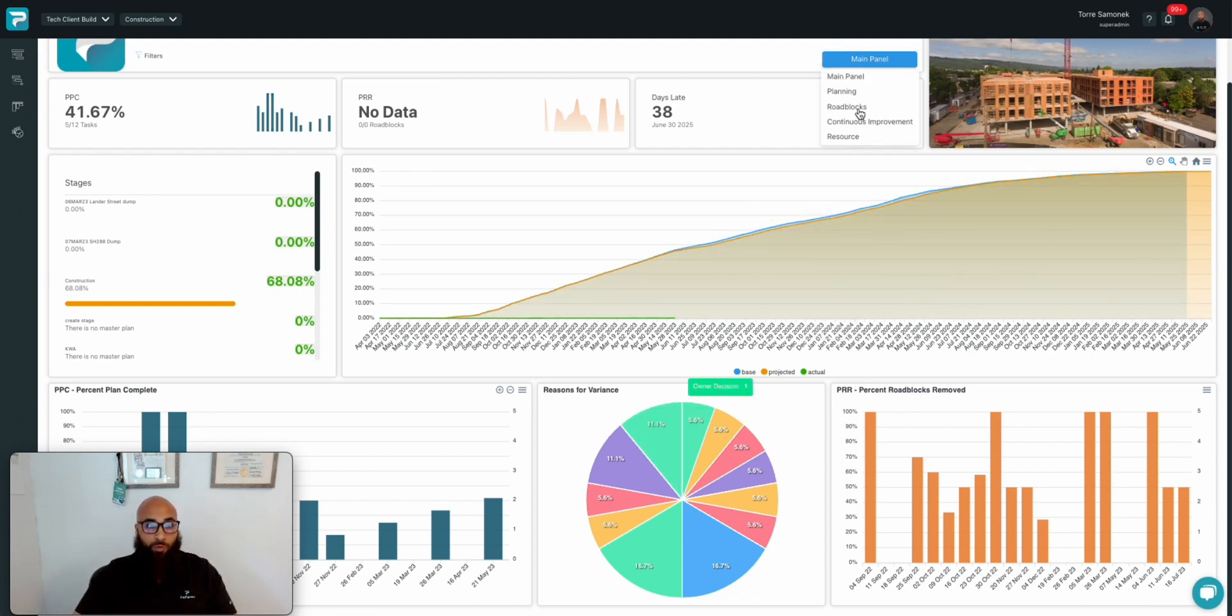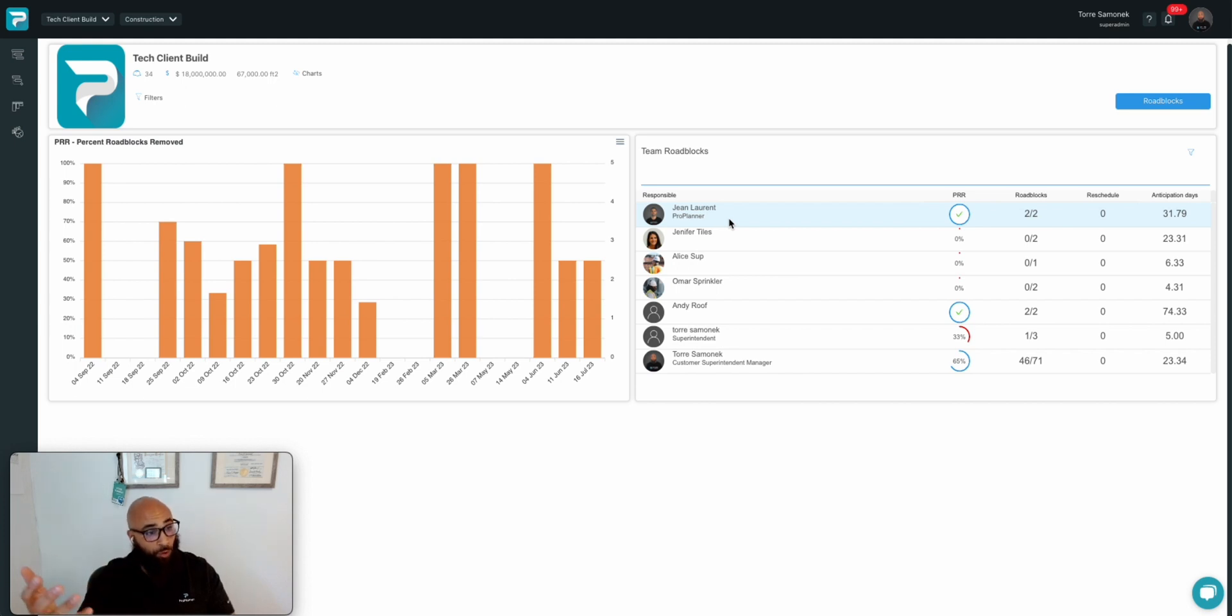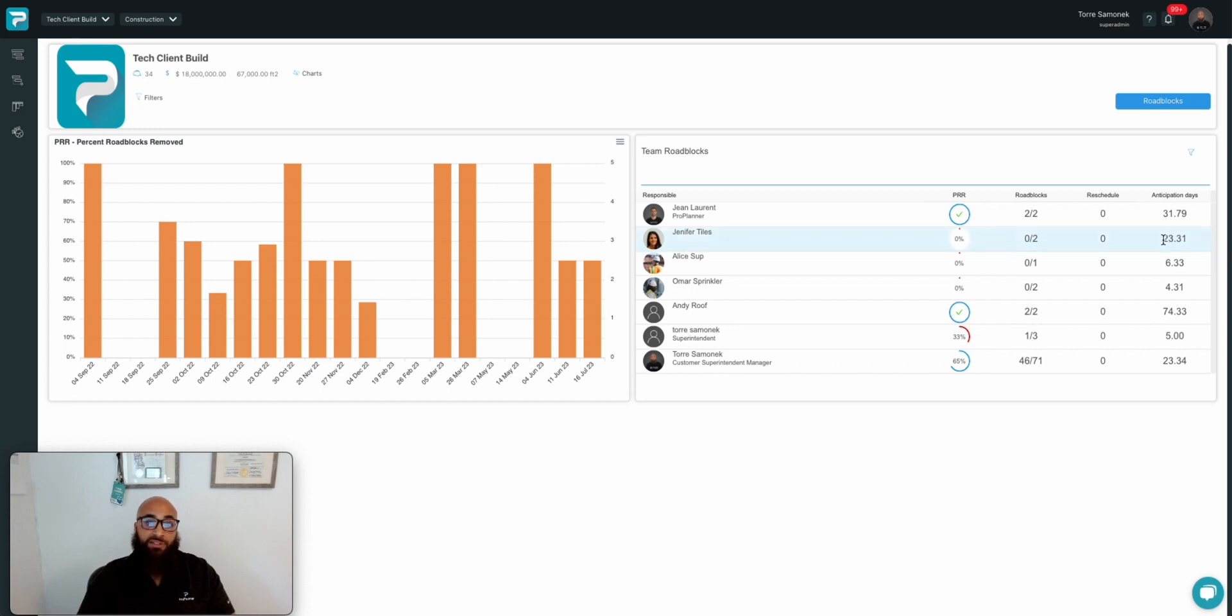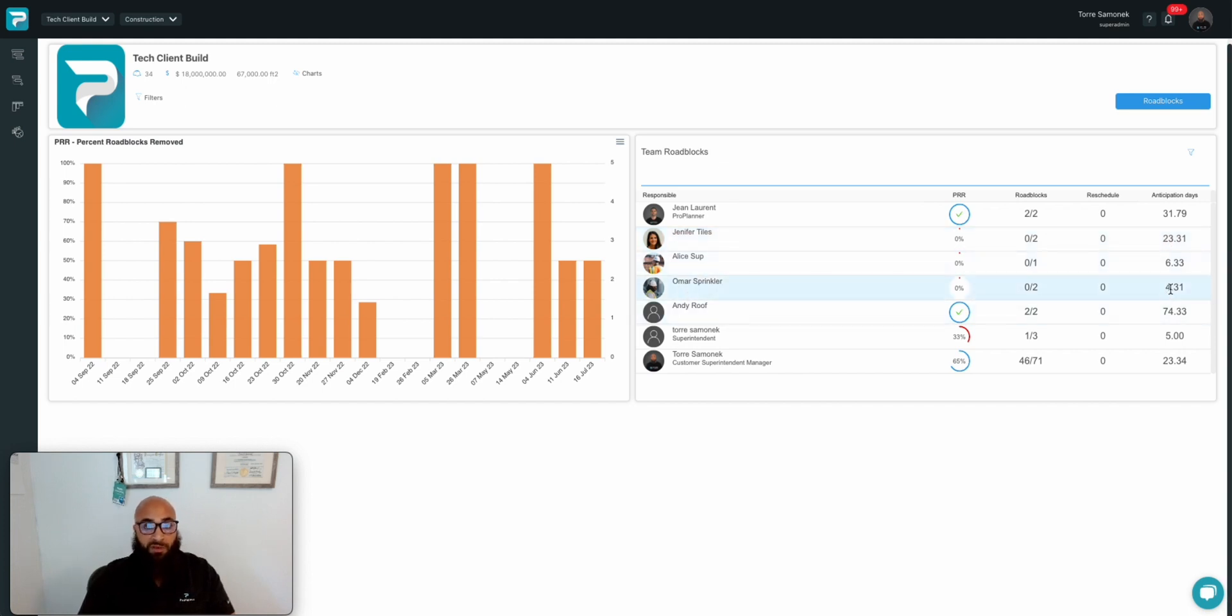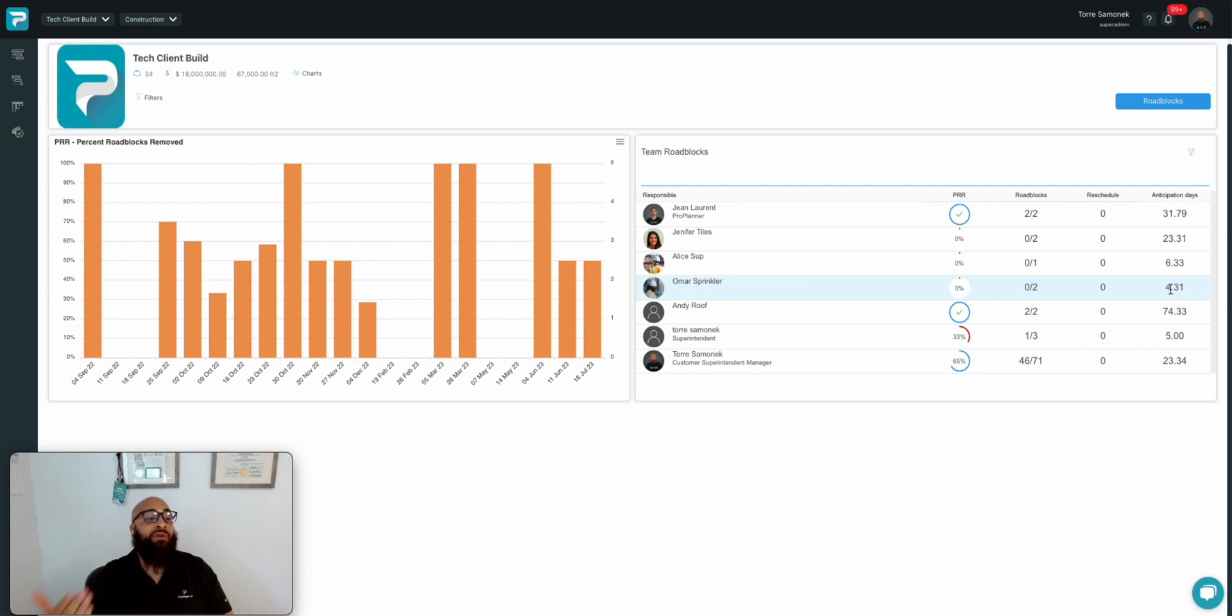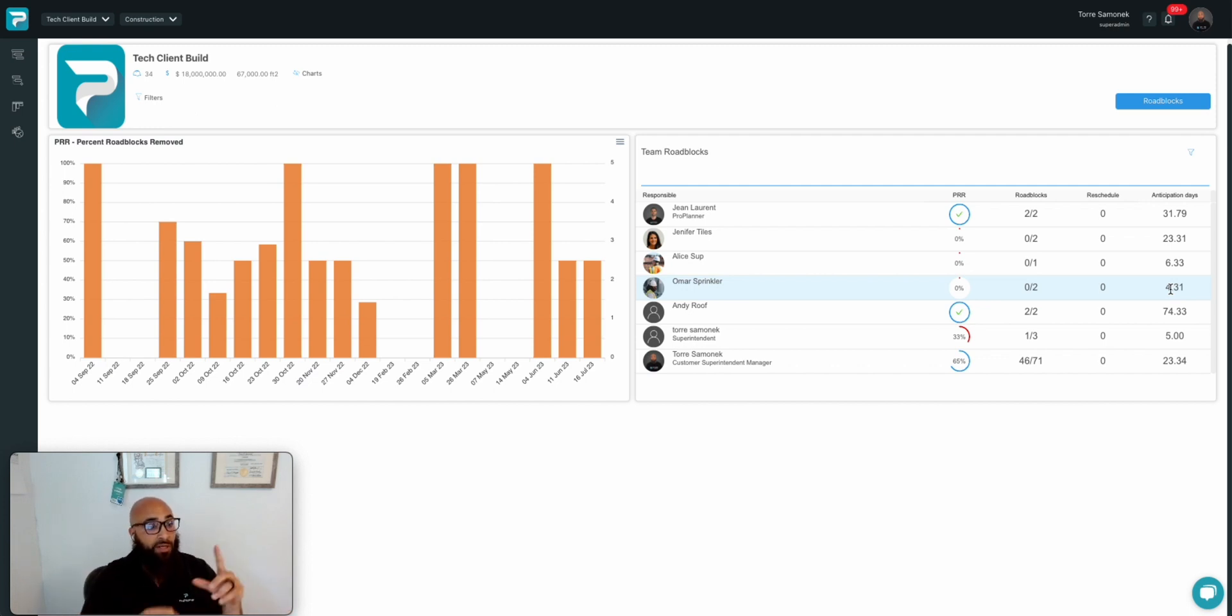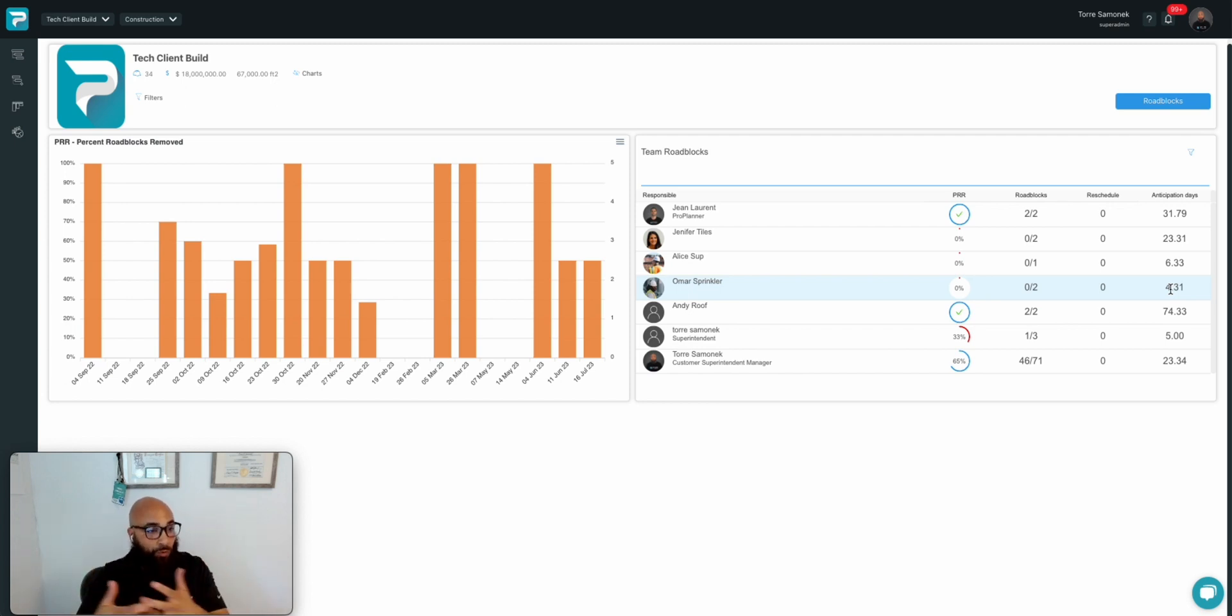We can also switch over to the roadblocks tab and see who on our team has been really getting into the planning and giving us a decent amount of heads up about a roadblock that may affect them before the work took place. In this case, you can see Jennifer has given us 23 days of heads up about a potential issue. That's great. Omar with the sprinkler crew has given us four days. That's not too bad either. What we're trying to avoid is folks coming on the day of a task or activity starting and saying, hey, I can't do this and here's why. When ideally in ProPlanner, being able to identify that as a roadblock and raise visibility to it before it prevents the project from taking place on time and before we encounter schedule delays is one of the goals of the roadblock system. Identifying an issue, raising awareness to it, letting everybody see what the problem is so collectively we can remove the roadblock and keep this project on schedule.